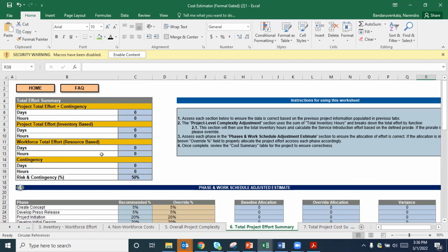So one of the projects right now, we are finding it difficult to get our infrastructure team members because they are fully loaded with other projects. So once this sort of an estimation is given way ahead of time, it gives the other teams time to prepare their resources and make them available for your project. So this is where the effort comes into the picture.